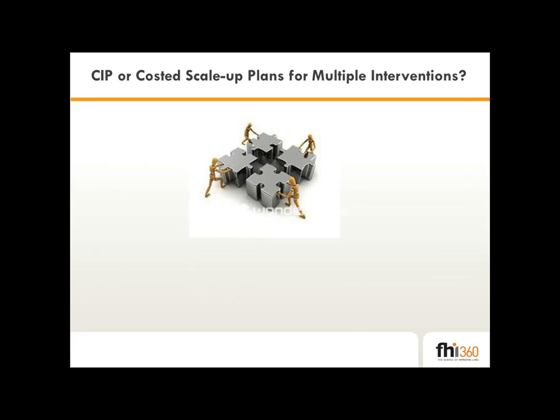So in the context of the topic for this webinar today, if you think about it, CIPs are really pieces of puzzles brought together, with each puzzle representing a costed scale-up plan for a specific intervention. In addition, in putting these pieces together, instead of in different plans, there's also the benefit of economies of scale across scale-up plans of different interventions. For example, trainings or guidance documents could be bundled up instead of developed separately.